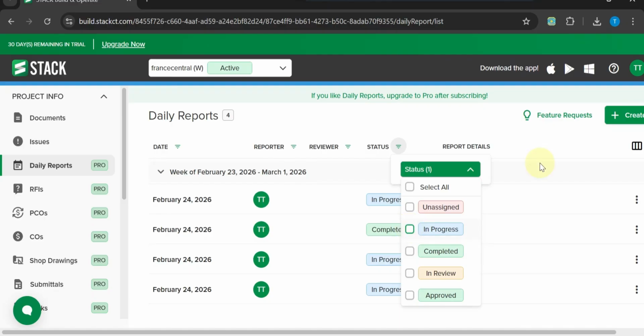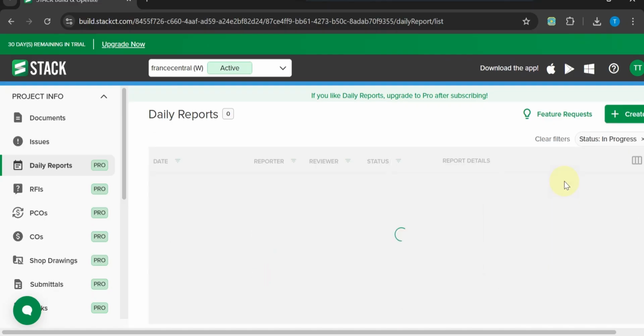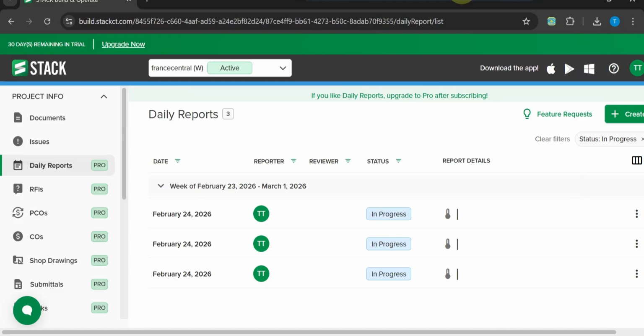Count what has been completed, identify what is overdue, and highlight what is coming up. This creates the Schedule Progress section of your report and supports what you saw in daily reports.